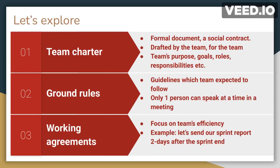The team members will know they don't have to spend time immediately after the sprint generating these sprint reports. Instead, they can continue with other activities and only after two days work on the sprint report. There is a subtle difference: working agreements are a little different from ground rules. Ground rules are established at the beginning of the project during team formation, whereas working agreements are specific to the team's ongoing work and are generally formed during execution.